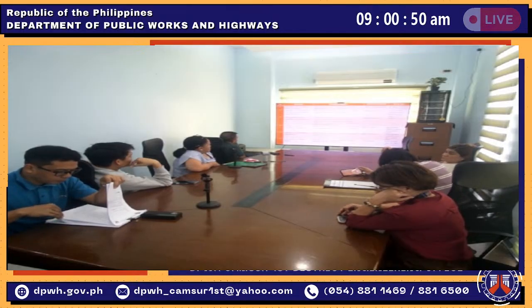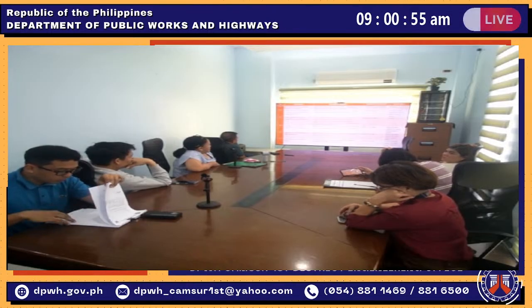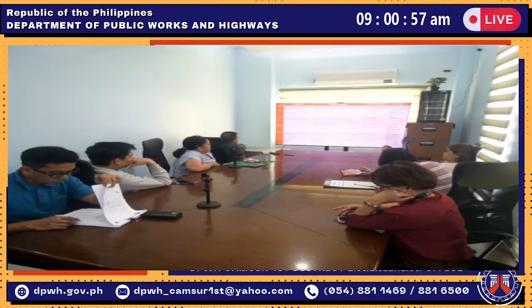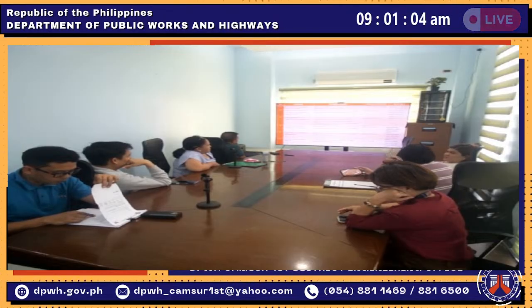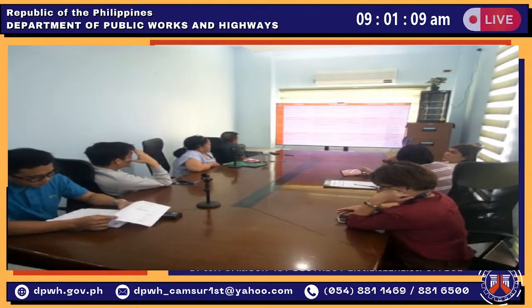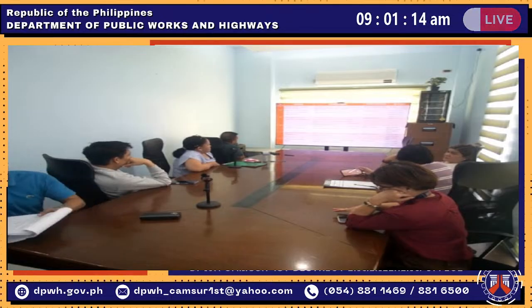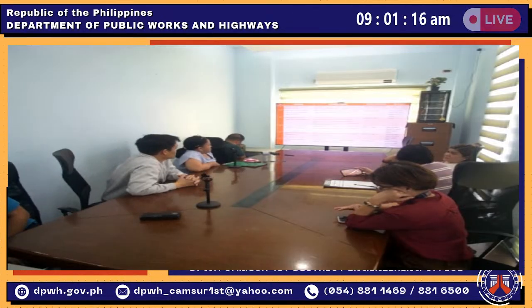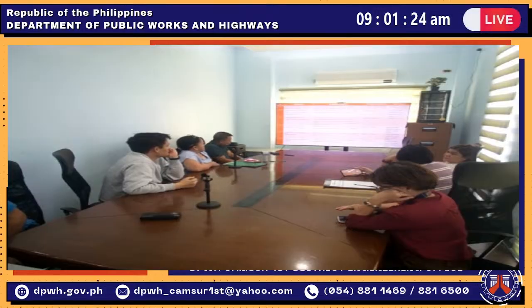Number 5, submission to DNR-MGB for GRR approval, accompanied by all required supporting documents for issuance of GRR within 27 calendar days, 3 hard copies for each report and e-copies. Number 6, final GRR and completion report, compilation of the entire process, responses to MGB, feedback, final GRR, and summary within 32 calendar days. 3 hard copies for each report and the e-copies.